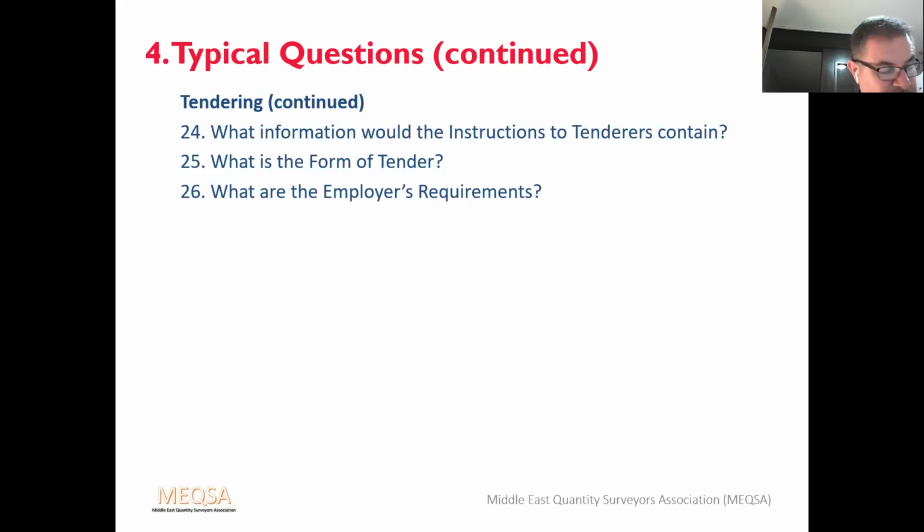What are employers' requirements? Usually using design and build, it sets out the client's requirements, i.e. the function, the size, accommodation, and the quality. It gives a level of detail, which depends on how much design has been done prior to the tender. Normally includes a current state of planning permission, and it should detail a level of design, the structure and specification information to be provided by the tenderers.